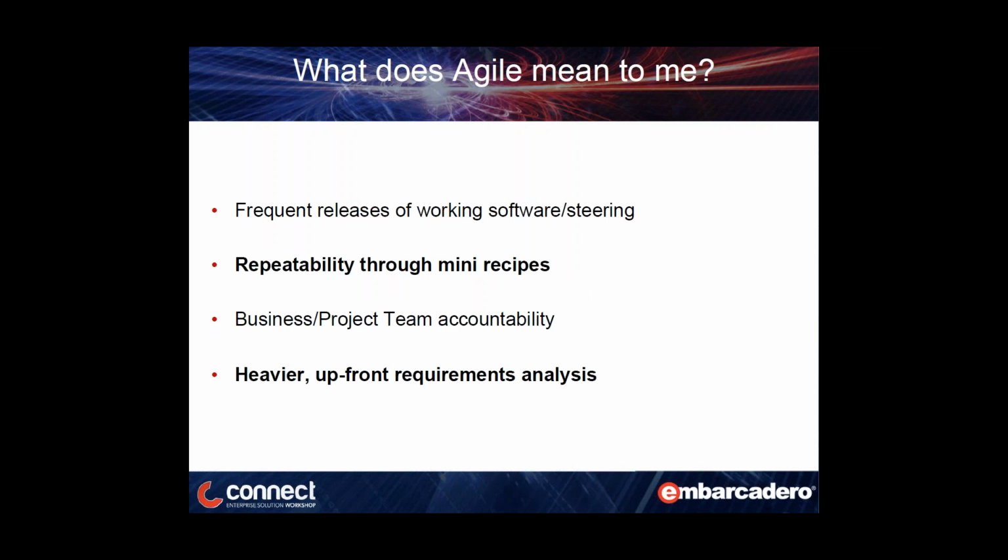From my personal point of view, I've been involved with Agile now for probably about 10 years. The previous company I worked for actually worked on an Agile project. And the very first Agile project I worked on was absolute chaos. It was a small, fixed-price project where we had a hard deadline, and we missed it by almost 12 months. We changed tack many times because Agile kind of let us do that, and it gave us basically zero accountability. So in the end, I think we actually lost a whole bunch of money on that particular project.